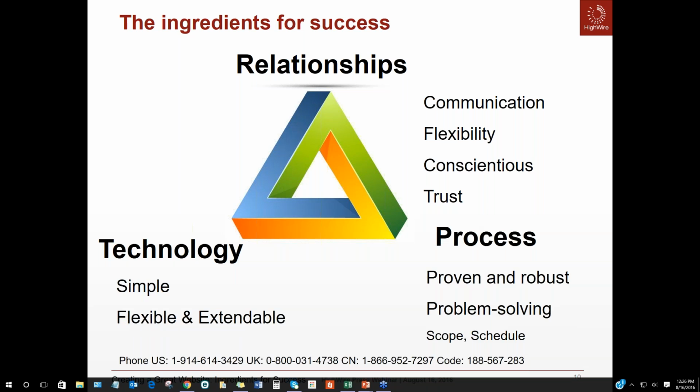Sometimes other stakeholders in the organization may bring something in very late into the game and they want to do something else, they want to change. Raquel's job on the publisher side is to ask that question. She asked, can we do this? And my response was, sure, we can do it. There may be some impact to schedule, but the approach was that we want to make sure we do something that works for everyone, and sometimes that requires time, so we just have to extend the schedule, et cetera, and we can do that.